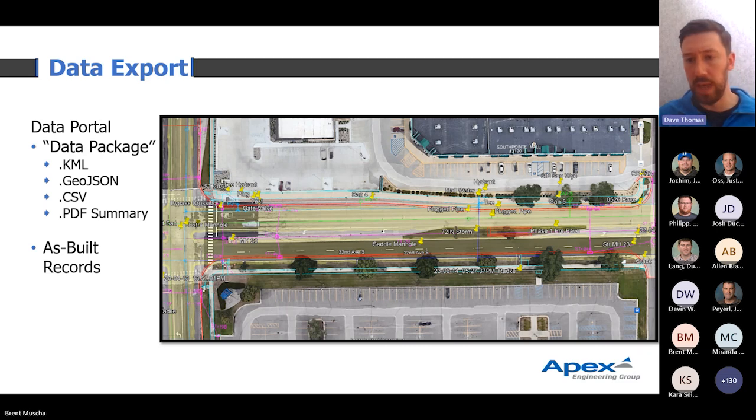I also saw somebody ask if this could be used for quantities as well. I'm not sure what the North Dakota DOT uses. We've had several other states that are customers of OnStation that also use AstroWare Project. We're exploring an integration through the Open API for that system to start being able to take our flags and our pictures, tag them with a pay line item, tag them with a quantity, and then transfer that information directly into AstroWare Project so that it can be used to pay the contractor.